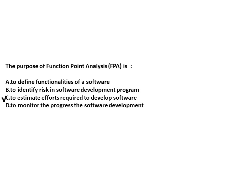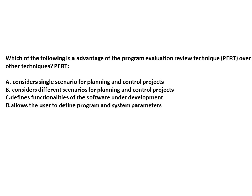The purpose of Function Point Analysis is to estimate the effort required to develop the software. Regarding PERT's advantage over other techniques: PERT considers different scenarios for planning and controlling a project. CPM considers only a single scenario, while PERT considers three scenarios — most likely, optimistic, and pessimistic.